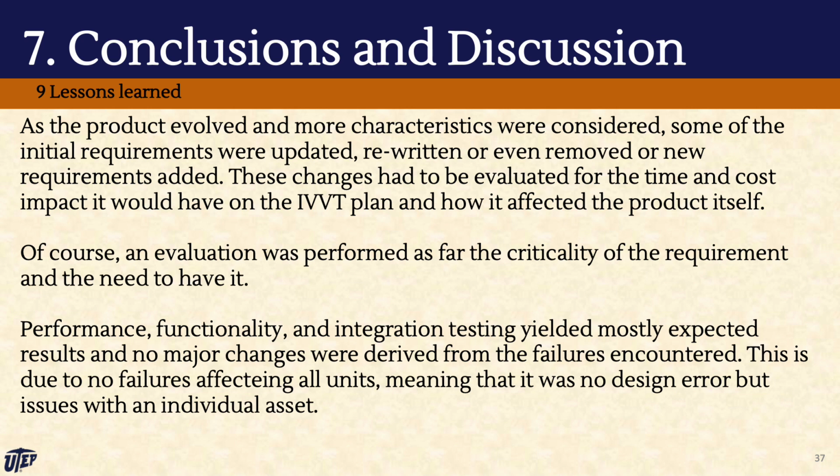In terms of lessons learned, as the product evolved and more characteristics were considered, some of the initial requirements were updated, rewritten, or even removed, along with new requirements being added. These changes had to be evaluated for the time and cost impact they would have on the IVVT plan and how they affected the product itself.